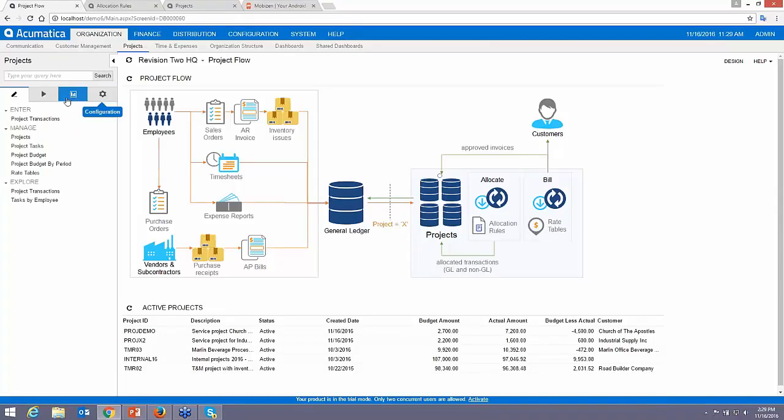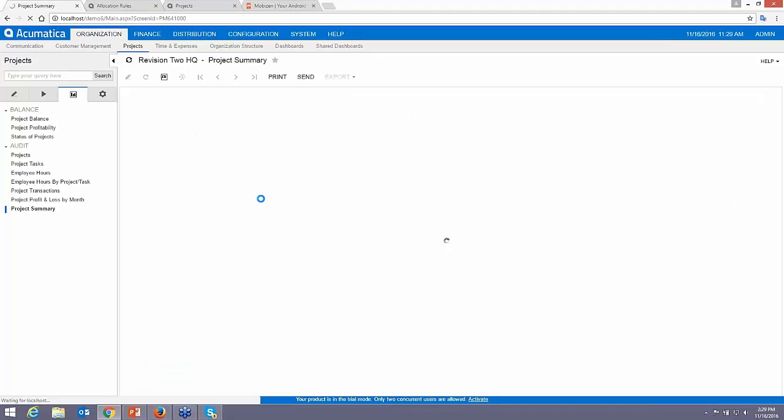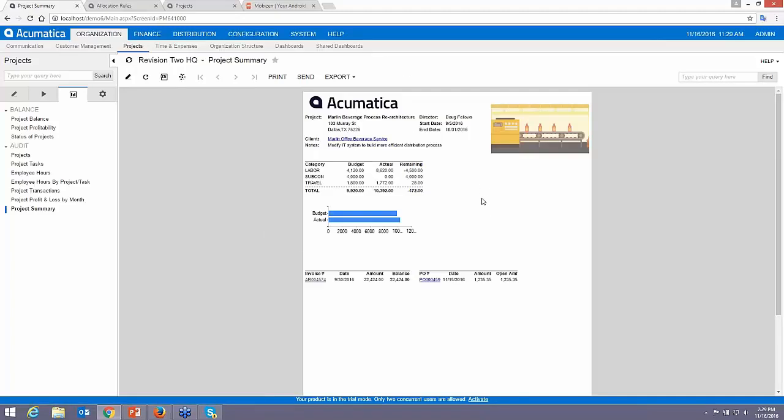The first thing that you can see is we have an area called reporting. One of the things that you can look at there is a project summary report. The default report that runs allows you to pull in things from various places. This isn't the project we just worked on, it's a different one. I can pull in pictures, I can pull in a nice bar chart, the budget, how you're doing according to budget. In this case, the budget even breaks down by line to see that your labor's over, but it looks like we stole some labor from a subcontractor. Maybe we didn't subcontract something out.